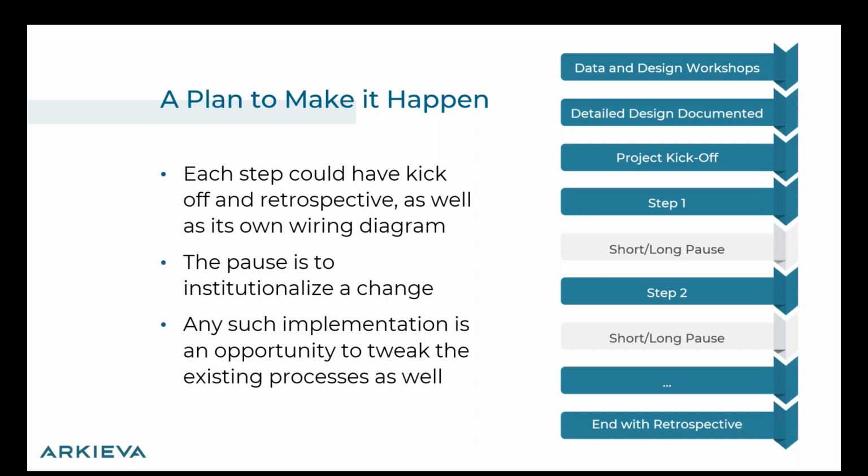Now you will see here in the picture on the right, after each step, there is a short and a long pause. And the idea is that the pause is to institutionalize a change. People should have the time to make sure that they can use the system in their process. As mentioned earlier, in any implementation of this kind, there's an opportunity to tweak the process as well. But very importantly, what I'm trying to say here is that these long pauses are very important to take the users along, and therefore should be part of the program that we publish at the end of the design workshop.